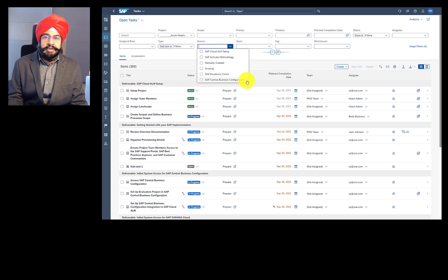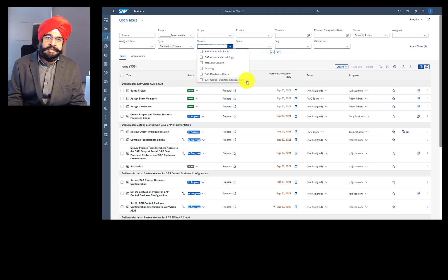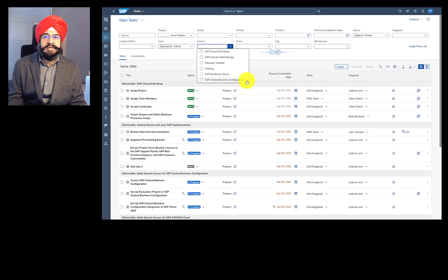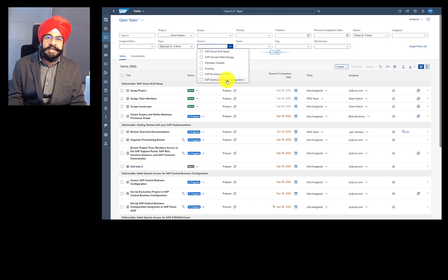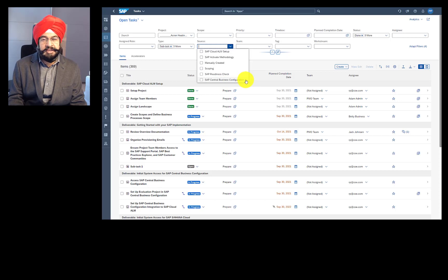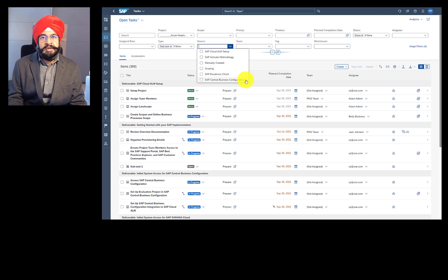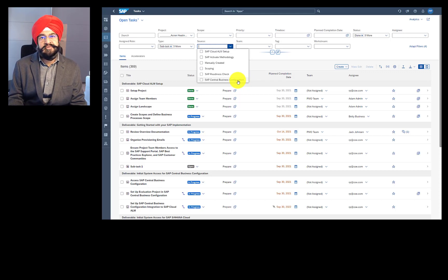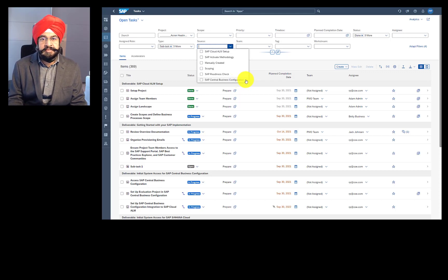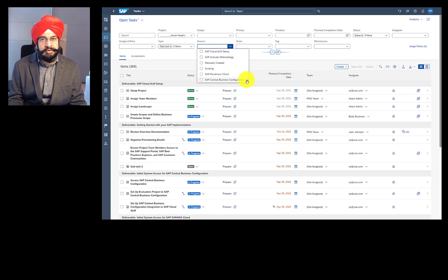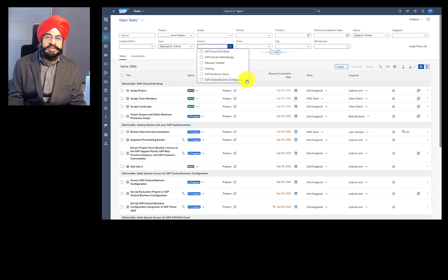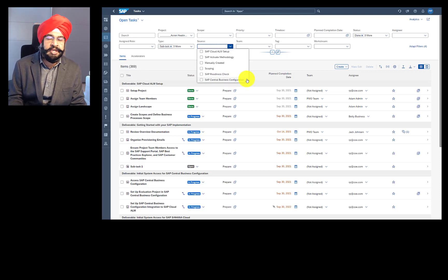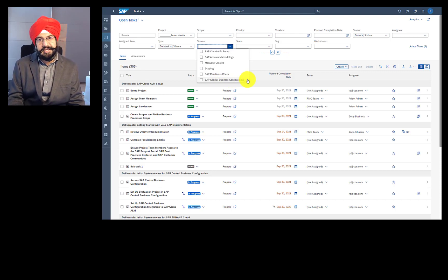You can also connect SAP Cloud ALM to SAP Central Business Configuration easily. Once you do that, then project activities from SAP Central Business Configuration appear in SAP Cloud ALM. The point to note is you cannot edit the status of those project activities. Here, Cloud ALM plays a read-only role for good reasons because SAP Central Business Configuration owns the status of those project activities and they appear as tasks in SAP Cloud ALM.